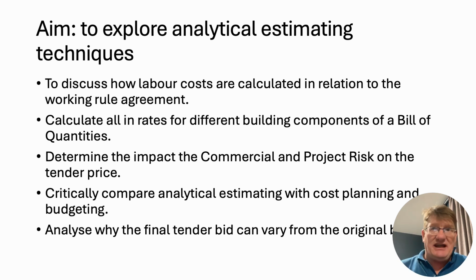So you're actually breaking down, say, a metre cubed of concrete. You're breaking it down into, well, look, I need a metre cubed of concrete. What have I got to do? What do I need to produce and lay a metre cubed of concrete? Well, I'm going to need concrete. I'm going to need a certain mix, C20, C30. Where am I going to get that from? One of the suppliers that are very close by to the site.